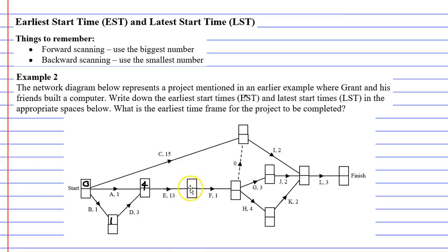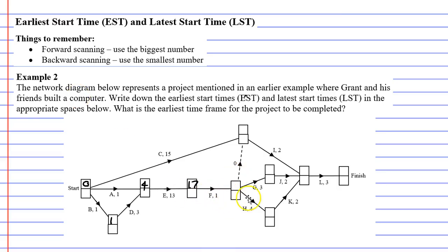Activity E takes 13 minutes and cannot start until four minutes into the project. Four plus 13 gives us 17 for our next vertex. Then moving on to the next vertex, activity F only takes one minute. 17 plus one gives us 18.